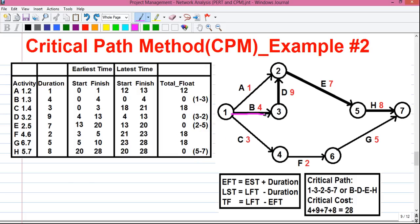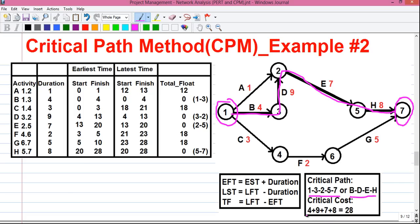If we link the critical activities, we get 1 to 3, 3 to 2, 2 to 5 and 5 to 7. This is our critical path. Remember, the critical path starts from the starting event — here event 1 — and ends at the ending event — here event 7 — and has the maximum value. So this path 1, 3, 2, 5, 7 has the maximum value of 28. Our critical path is 1-3-2-5-7, or in activity notation B, D, E, H. The critical path cost equals 4 plus 9 plus 7 plus 8 equals 28. So we can say the minimum time needed to complete the project is 28 weeks.